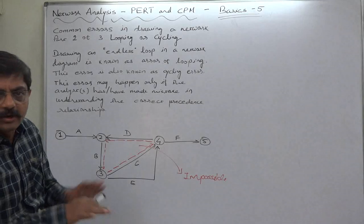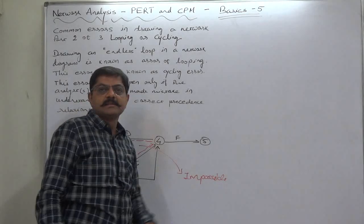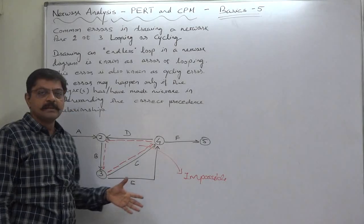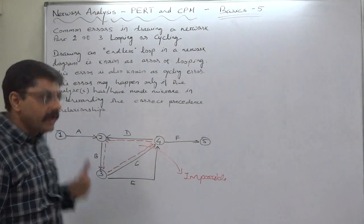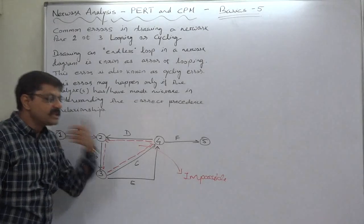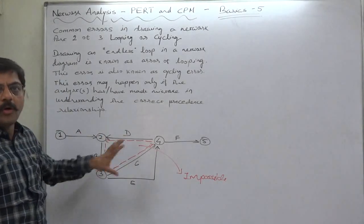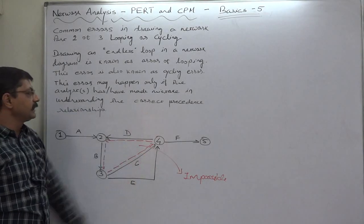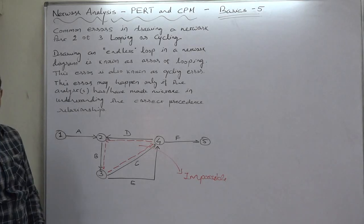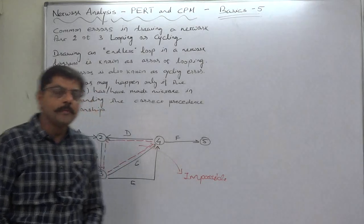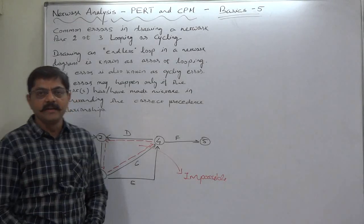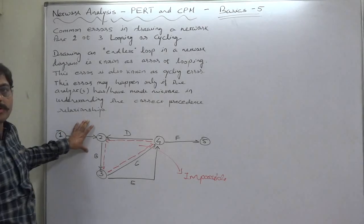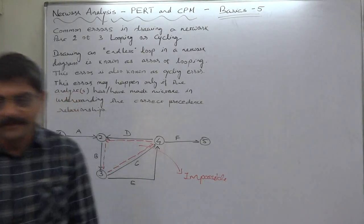So this is impossible kind of situation and this may be an error in drawing or making misinterpretation at the time of drawing the PERT chart, or mainly because of mistake in understanding the correct precedence relationship by the technical persons who provides the technical information about the whole network to the person who draws the PERT chart. Thank you very much.